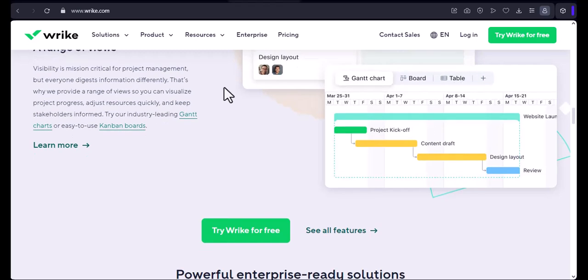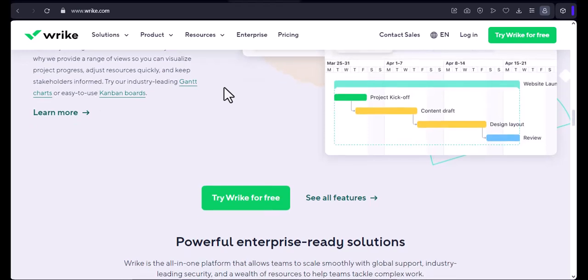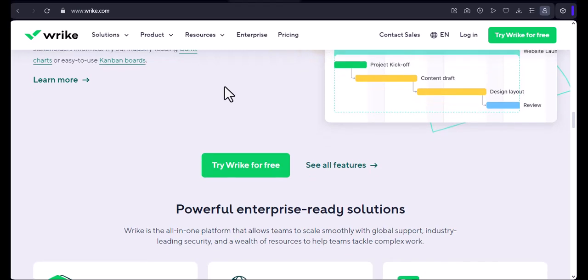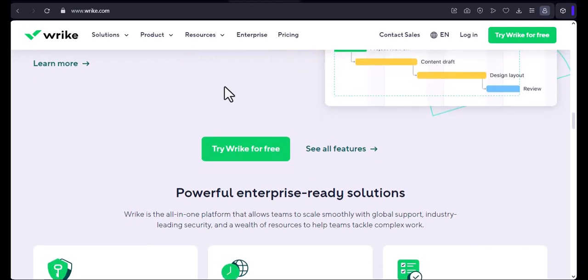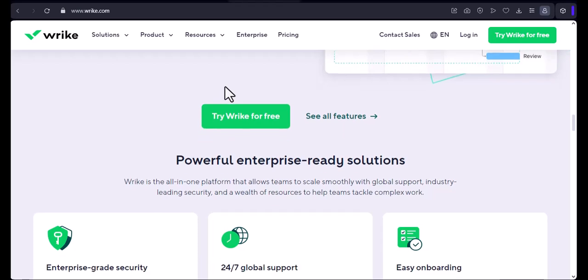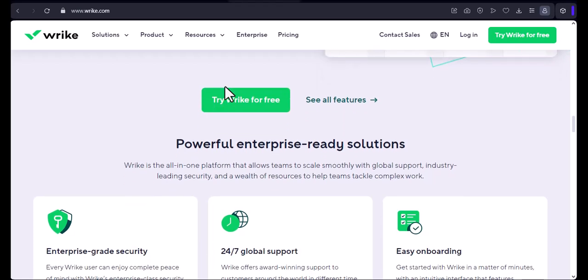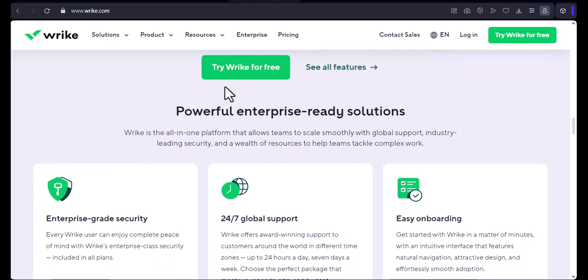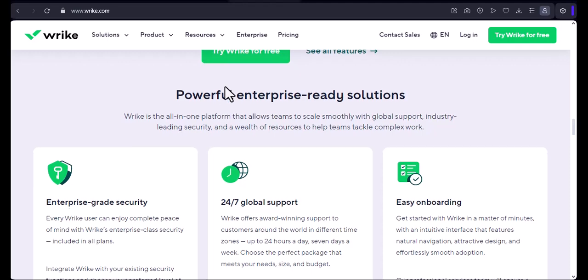In Wrike, permissions are managed through access roles. By default, Wrike offers roles like admin, regular, external, and collaborator. These are a good starting point, but you'll often need to create a custom access role. For example, you might need a project viewer role that allows members to see tasks and reports, but specifically prevents them from deleting or editing anything.